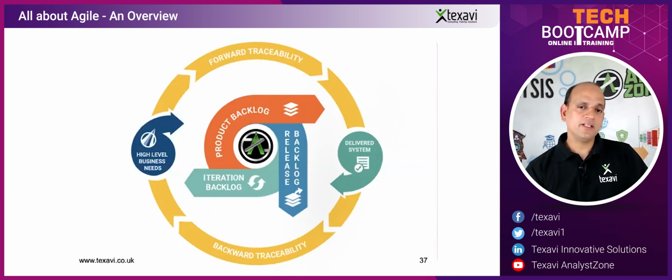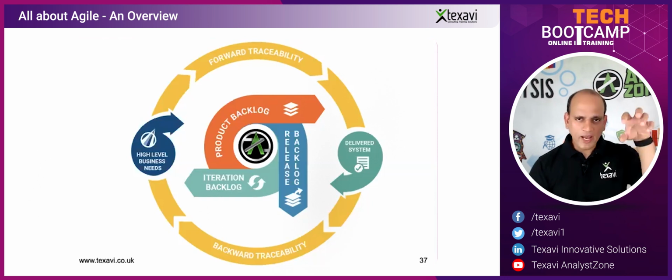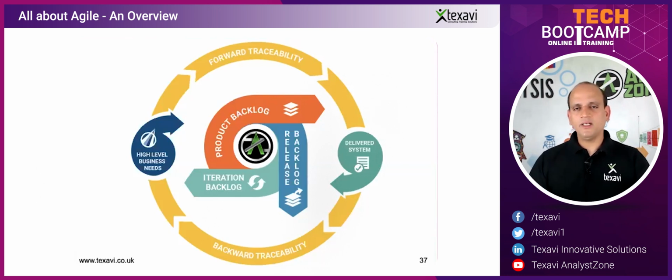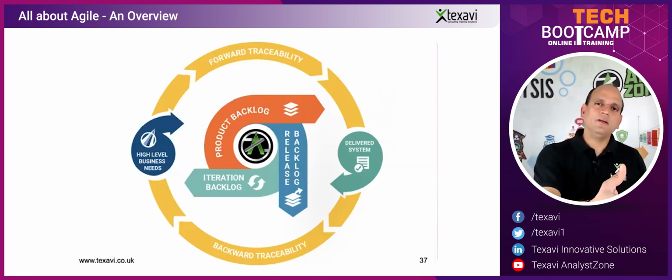So the product manager can go back and say, you know what, course correction, guys. I think this is not really important. We've got feedback from the customer saying that we need to have the payment processing first. So you hold this piece of work. Initially, you were supposed to work on the next bit to add more functionality to the catalog so that you can complete that in November. But the beauty with Agile is you get the feedback from the market, from the customers, from the business, and if you think something is not really important or urgent, you park it aside and take up something which is more urgent.